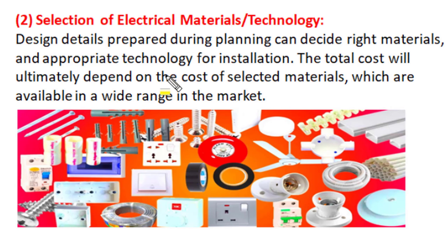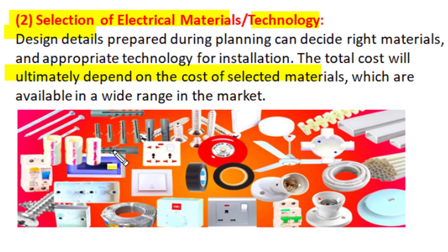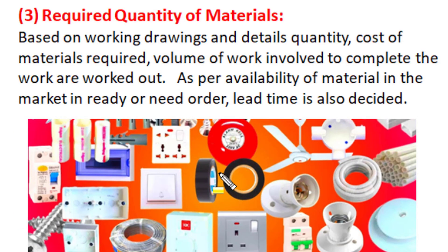After approval and financial sanction, the second important purpose of electrical estimation is selection of electrical material, technology, and workmanship for execution of electrical installation work. In estimation, we do rigorous planning and prepare design details used to select the right material and appropriate technology. The total cost of any electrical installation ultimately depends upon the cost of selected material, and in the present market a wide range of material of different quality and cost values is available — so making an appropriate selection is part of electrical estimation.